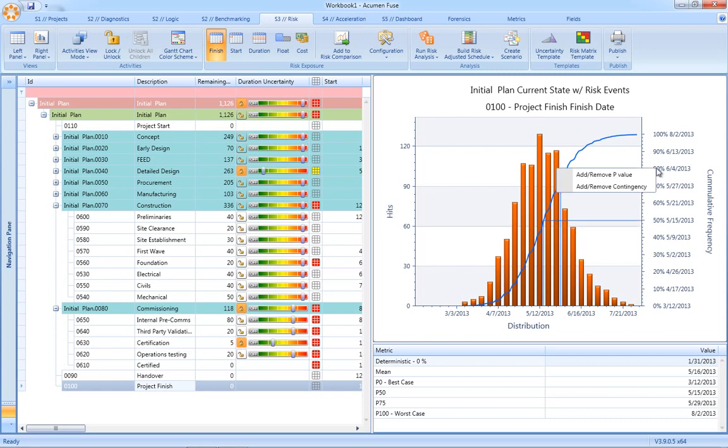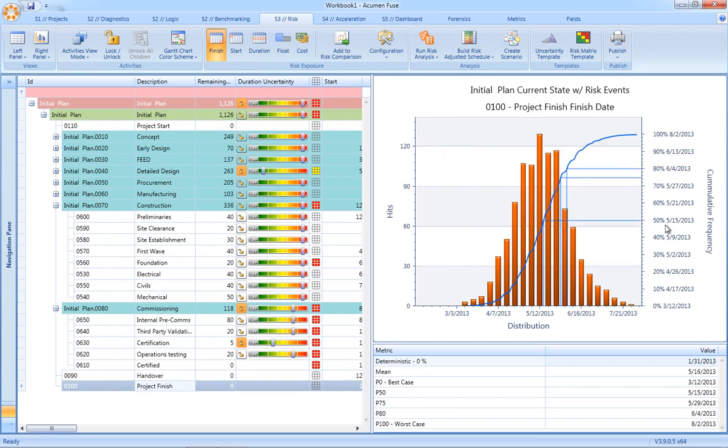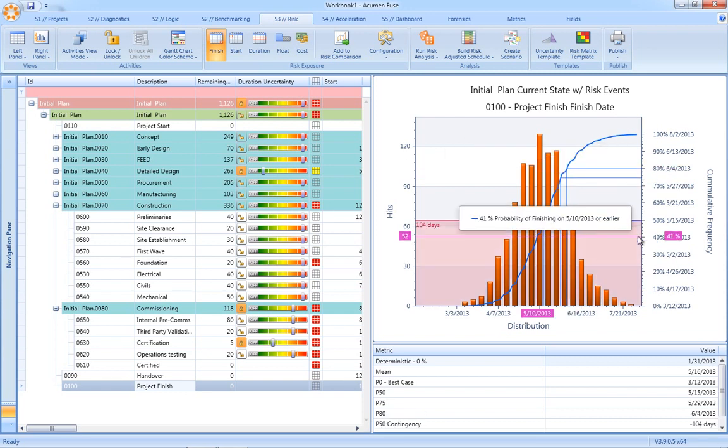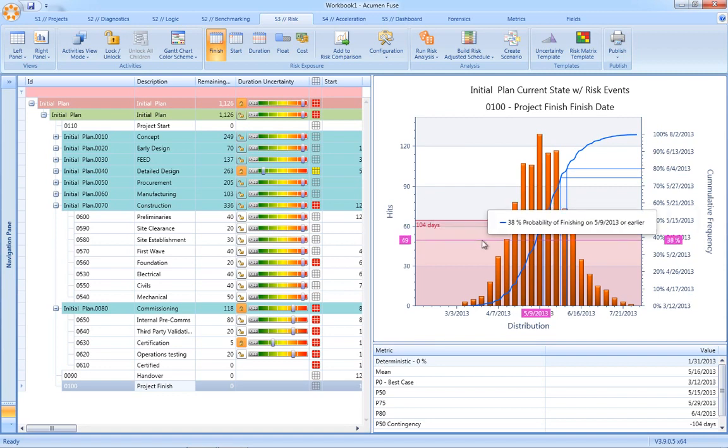Additional p-values can be added to the report and in a similar manner, contingency can immediately be seen simply by clicking on the chart.